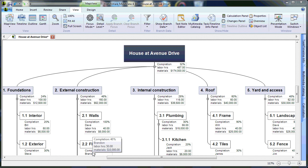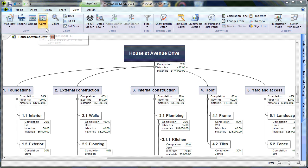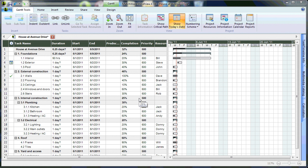One of the benefits of using MindView to create your Work Breakdown Structure is that with one click, you can convert it into a fully functional Gantt chart. Under the View tab, choose Gantt, and MindView will convert your WBS into a Gantt chart with task name, durations, start dates, end dates, predecessors, completion levels, priorities, and resources.